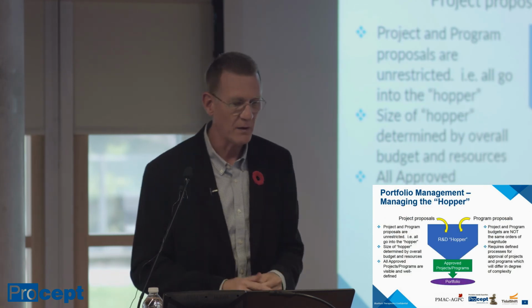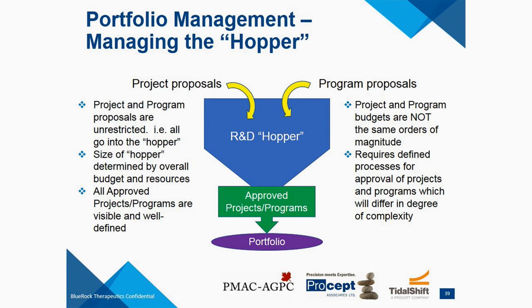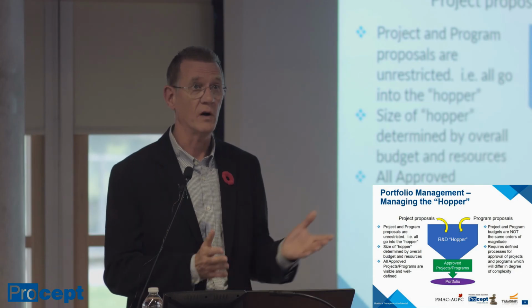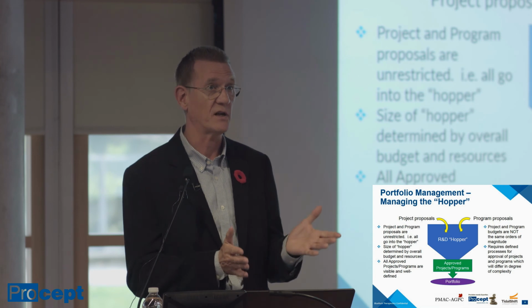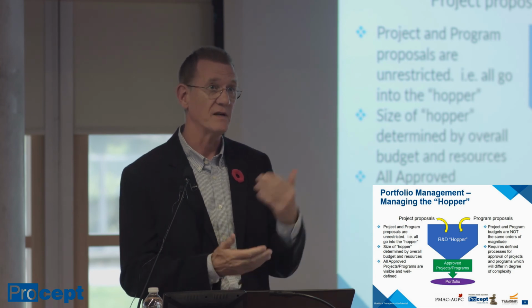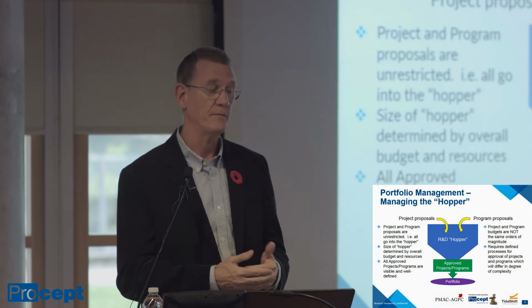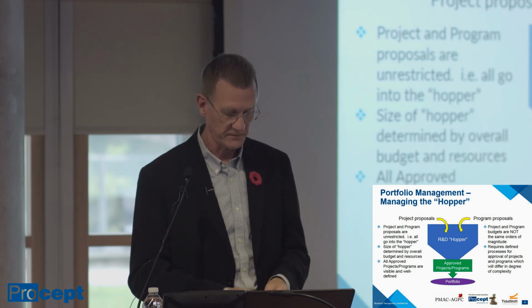The other thing we looked at was this so-called R&D hopper. You can imagine a company like this is always looking at new opportunities. And so again, because of my experience with having not had the control over the R&D hopper, we made sure that we built a process and system that would allow for one process for projects to come into the organization, be evaluated and decided upon. And that was also very effective.